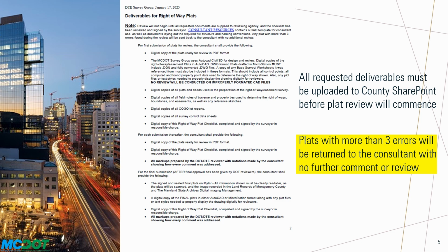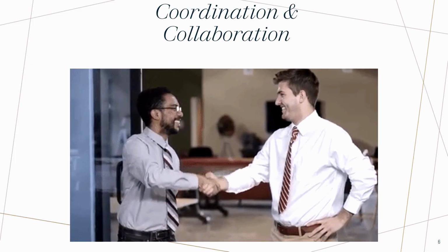Property acquisition can be a lengthy process. It involves many required steps, often taking a year or more through negotiations with owners, and many times it is this final step that can delay the start of construction. This tutorial and all of our efforts are intended to provide our consultants with the necessary information to train your personnel to properly prepare plats for a smooth, rapid review and approval by county staff.